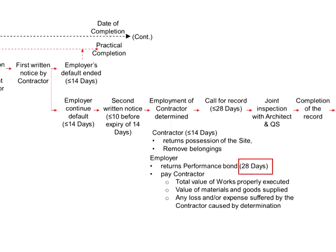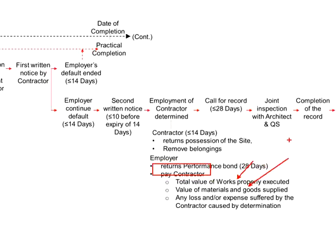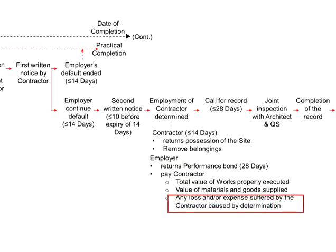Within 28 days, the employer will need to return the performance bond to the contractor and pay the contractor the total value of the work which has been properly executed, the value of the materials and goods which have been supplied, as well as any losses or expenses suffered by the contractor due to the determination. As the default is due to the employer, all losses and expenses suffered by the contractor shall be imposed onto the employer.